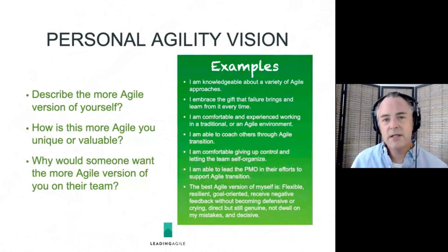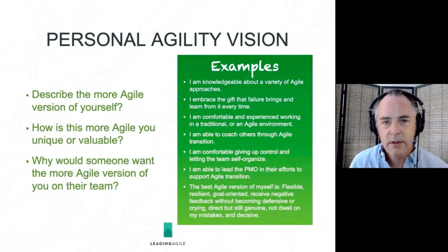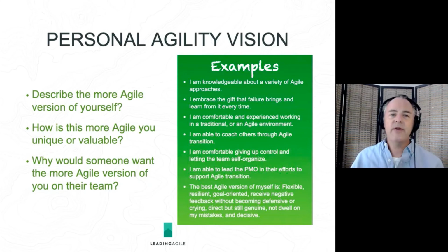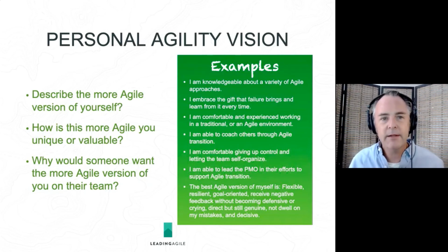In an organization that says it wants to be agile, it's really easy to see this kind of stuff. They say they want to do Scrum. They say they want you to be able to deliver every 2 weeks, but they've got everybody split across 5 different projects with 4 different teams. So nobody's fully dedicated to anything. So you can't really get the value of Scrum in a model like that. It's not going to be able to work.